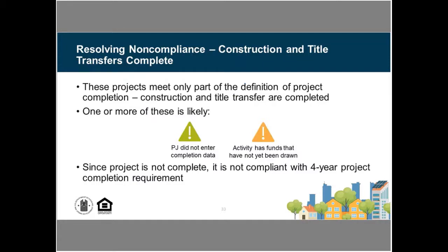It also might be that the project has been completed, but the funds haven't been yet drawn for that project. And so since that project does not meet all of the elements of project completion, it's been flagged as non-compliant because it's not meeting those requirements.